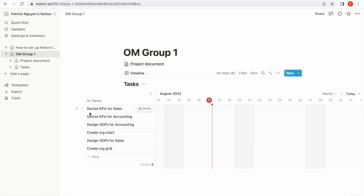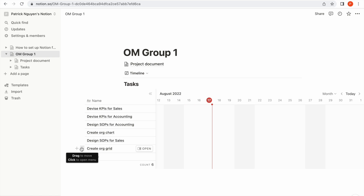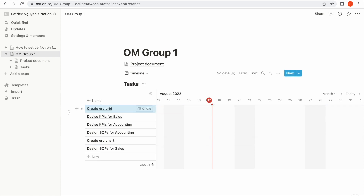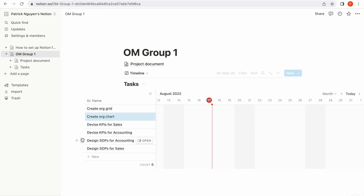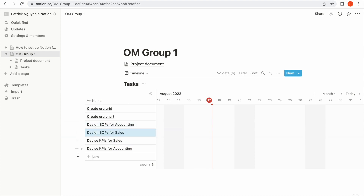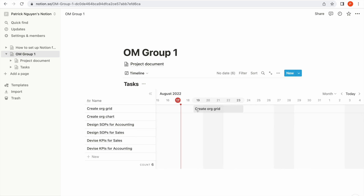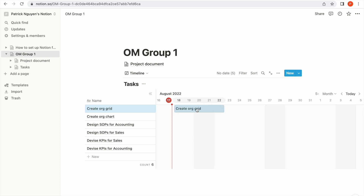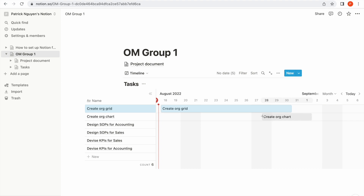Before we create the timeline for each task, you can see that they've been mixed up a little bit, so you can reorder them the way you want. It seems about right. Now I will assign each task a certain timeline. For example, if I want to do the org chart from August 18 to August 22, I'll drag it over here. Or if this task takes longer than a week, I'll drag it to change the timeline, and the same goes for other tasks below.